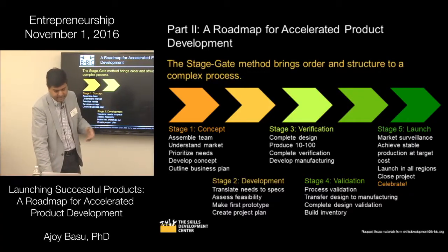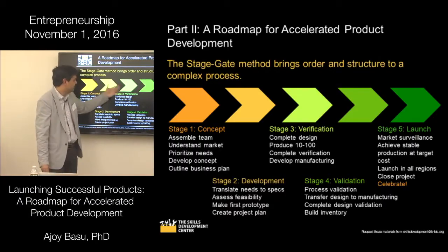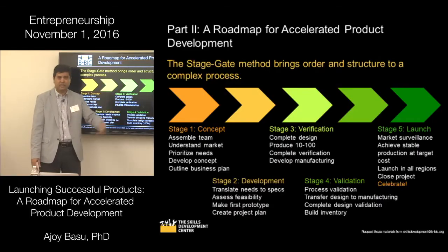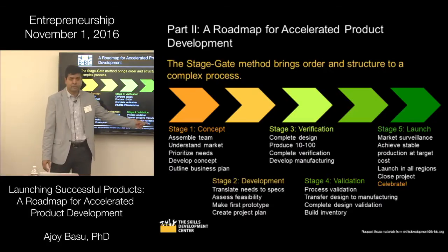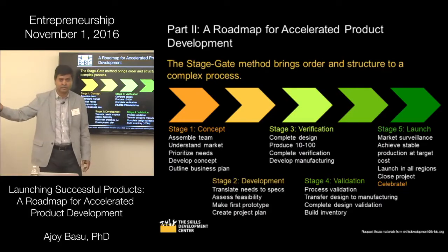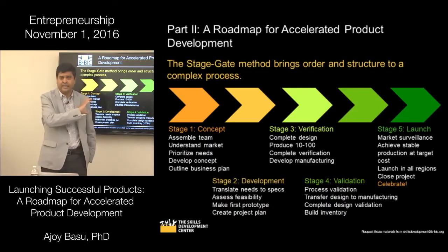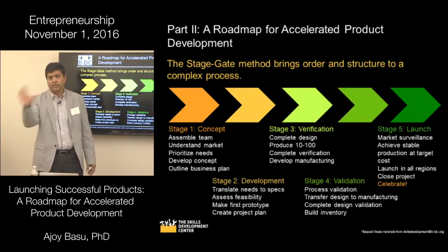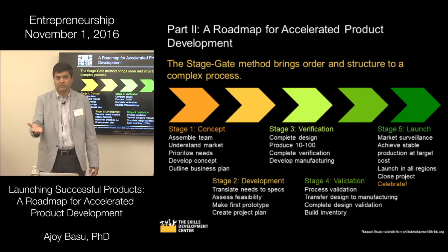Then the next stage is, because we're a medical device, we call it verification and validation. Verification, you're making sort of 100 pieces of it. You've got prototype manufacturing, you can make a few of those, if you will. By validation, you should be able to mass produce. I'm able to do 1,000. I have nailed down all the manufacturing, where it is going to be manufactured, what the supplier base is, the whole gamut, if you will, right?